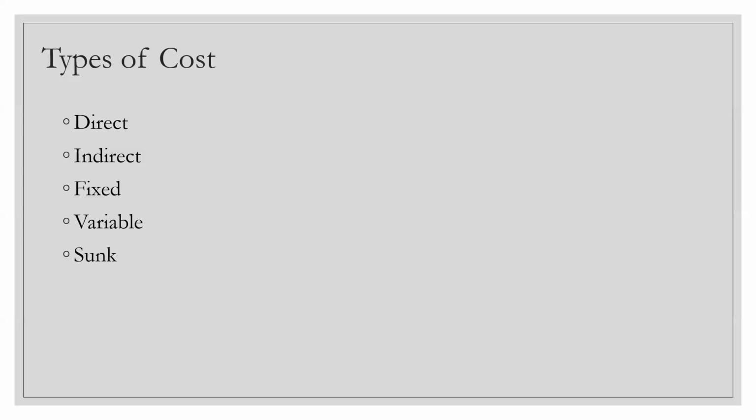They have to travel to the office once a month to ensure they are synced with the team and up to speed with what the team is doing. Now that will not be a direct cost to the project. Okay, it depends on the resource skill as well. If the resource skill is rare, then that is something you might want to bill to that particular client. So it depends sometimes, but indirect costs are the ones which are the cost of the lighting, heating, the physical infrastructure, the rental of the building, and so on.